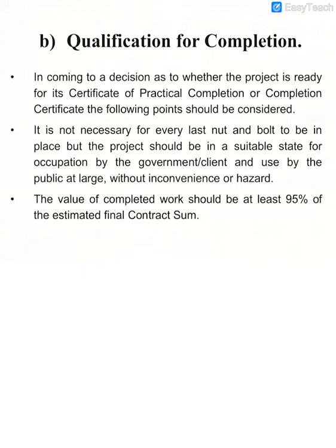So not necessarily all of the project is completed, but before issuing the certificate of practical completion, they have to make sure the building or the structure is able to be occupied by the client or the government. Only then can they issue the certificate of practical completion.